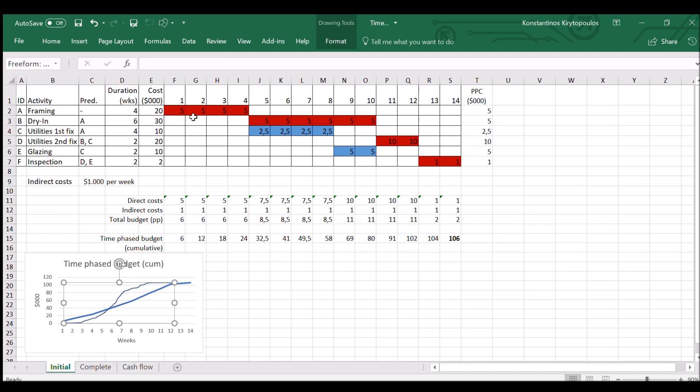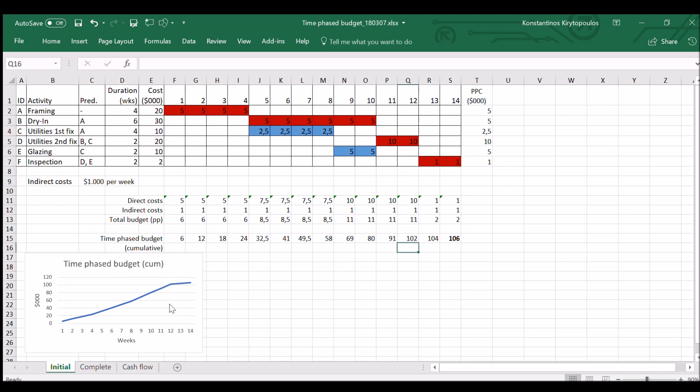which is not the case here because the project is very small. Usually you have a slow increase in cumulative costs initially because there are not many expensive things happening initially. Then you have a center phase where you have the most expenses, and then a phasing off of the project where the expenses are relatively low as well. So what we have done up to this point is that we have created the time-phased budget.